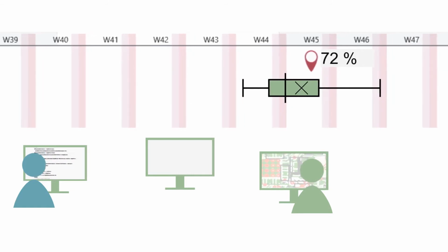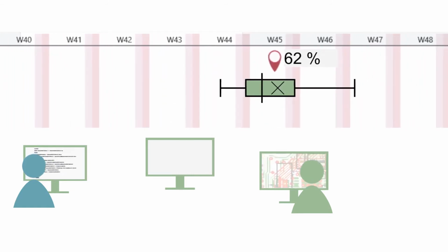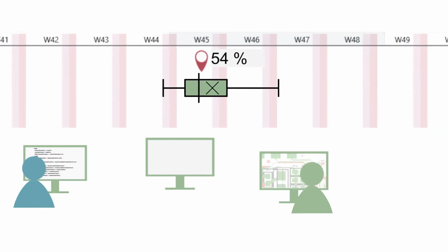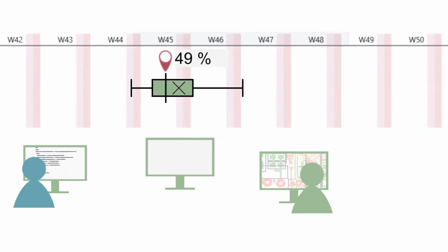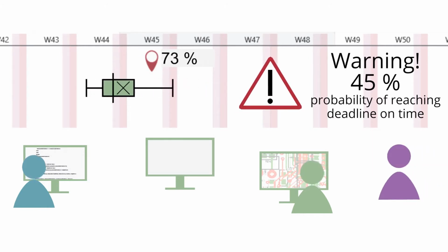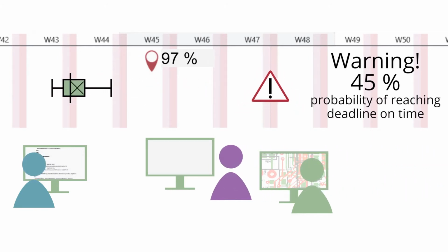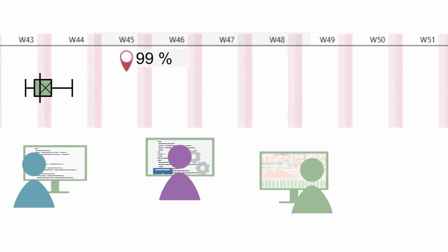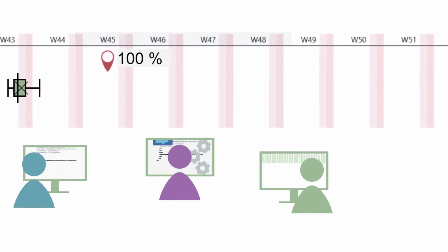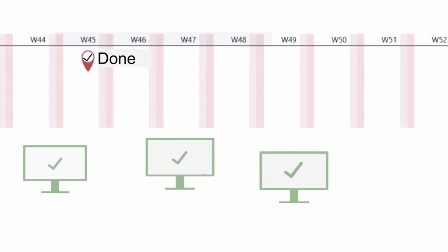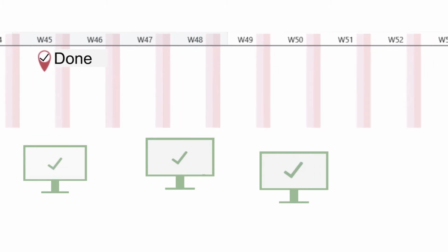It can be affected not only by work and changes in your project, but also in other projects with higher priority, and by team members' personal schedules. If the probability gets uncomfortably low, you test which mitigation strategies will be effective and when you will need to deploy them. This early warning system gives you more time to fix the problem and a better chance to avoid expensive and exhausting last-minute crunch times.